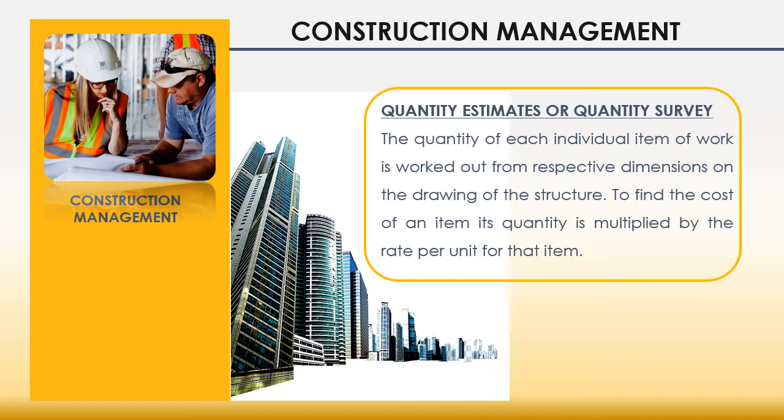A qualified or experienced person who does the mentioned works like taking off, squaring, abstracting and billing is called the quantity surveyor. Some duties of quantity surveyor are: they have to prepare the bill of quantities, that means the taking off, squaring, abstracting and billing. They also have to prepare the part payments at intervals during the execution of work. They have to prepare the bill for adjustment in case of variations which happen during the execution of work.